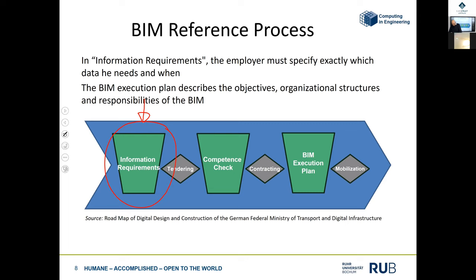Of course you are able maybe to plan or design a bridge, but do you have the competence also to give me the data? And therefore we have some kind of training programs in Germany, and then normally you show maybe previous projects or some certificates, and then you can check, okay, he can really do this. And after the tendering process, when you go into contracting, then you write everything down into the BIM execution plan, where you really specify in detail how we want to work in a digital way in our contract.